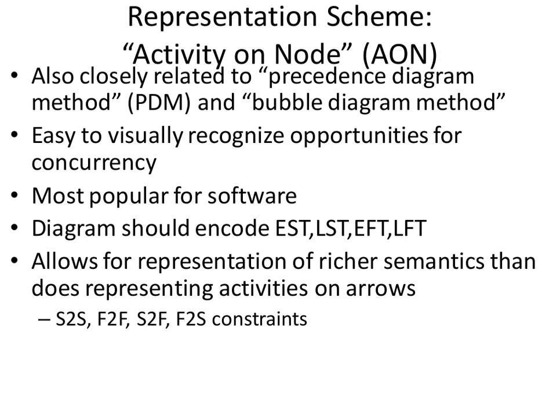Now, what we're going to get out of the scheduling algorithm is listed here, these 4 items here, okay? We're going to get out, for each of these tasks, 4 things, and sometimes they're put in the 4 corners. So one is early start time, okay? The early start time. And what this means is sort of the soonest that it could start, given all the activities that have to be finished before it.